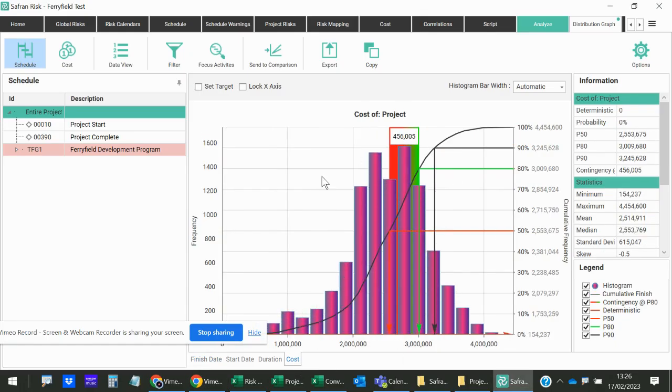I can now see in the cost tab under my schedule exactly what my P50, my P80, my P90 risk pot looks like. So I can do that by applying it to the schedule. And again, it doesn't have to be a resource loaded schedule. We could just have a very, very high level schedule, and I've just applied some risks to it.